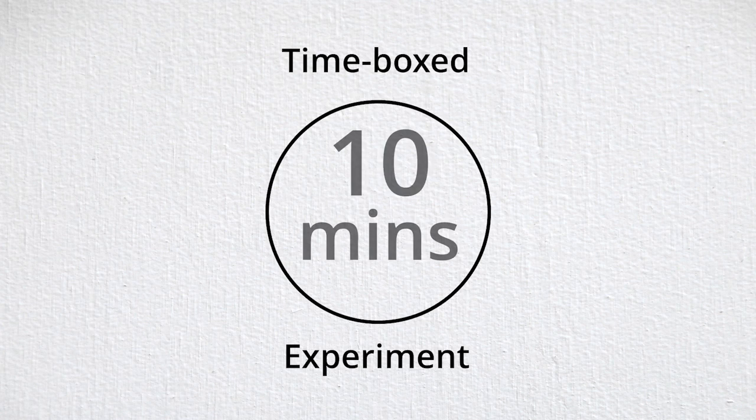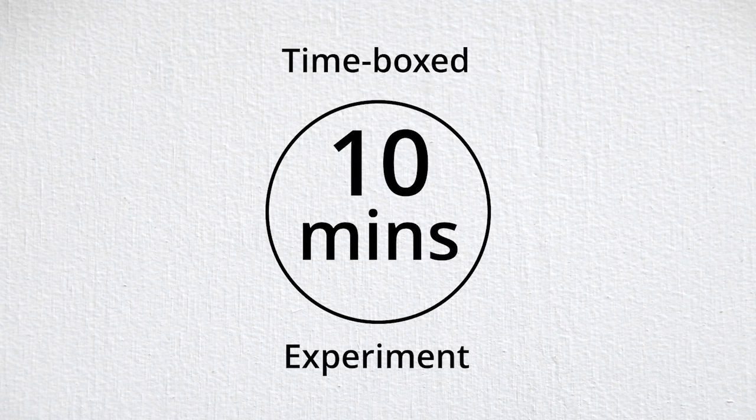This little exercise allows us to quickly estimate the effort of our four climbs, not in absolute terms, but in relative terms. This information forms the first piece of the puzzle. We might now have an idea of the relative effort of climbing one building compared to another, but we still need to work out an estimate for the duration of the overall exercise. How about we first invest a little time to actually test our fitness? Let's timebox this experiment to 10 minutes, which will now form our nominated sprint duration, and let's see how far we manage to get.